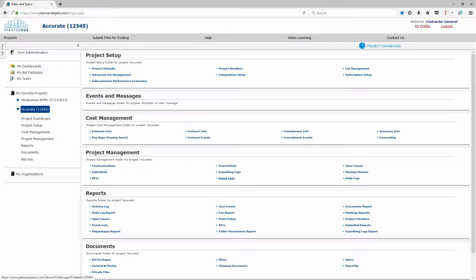Punch lists have a very specific meaning: they're going to be done at the site in order to close out a project. Typically, you'll have your pre-punch, post-punch, whatever that might look like. Issues would typically be anything outside of that, so it can be from the very beginning of a project all the way through the end. It's when you want to assign somebody either within your team or outside of your team something to do, something to remember, just something to be done.